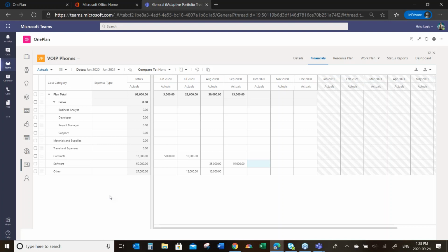And third, and that was Jim's slide just a minute ago around integration, it's common that clients will ask us, well, can I get these actuals from our financial system? It is our book of record. What I want my PMs to do is to see the actuals, understand their impact on their budget, revise their forecasts, and make decisions regarding the execution of the project. I don't want them to be entering financial data that's done elsewhere in the proper book of record, and we don't need to. So in those situations, we can leverage the tools we have to go and pull that financial data in and have it appear here so the PM can then act on it.